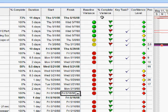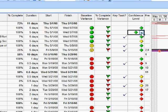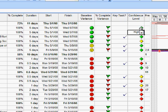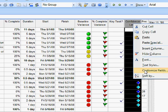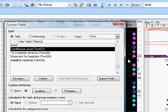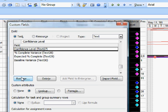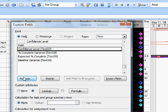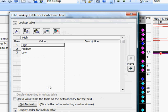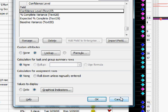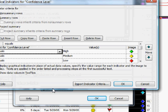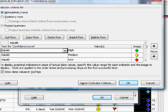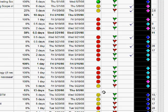The next one is also based on a formula. These two here are based on input tables as you saw. I can choose a value here. So again let's right click on that, click on customize fields and look at what we did. This is the confidence level field. We chose text 27 and renamed it but in this case instead of using a formula we have a lookup table. Let's look at the values, not surprisingly high, medium and low. We'll close down there and let's look at what we do. The graphical indicators, very straightforward in this case, we simply choose indicators to represent each of those conditions. So in a nutshell that's graphical indicators for you.